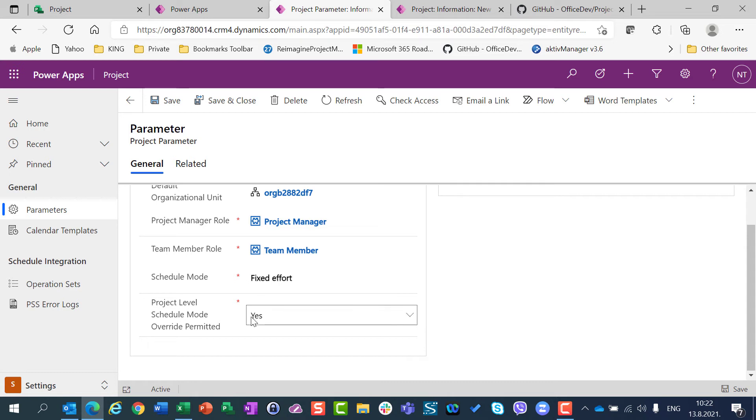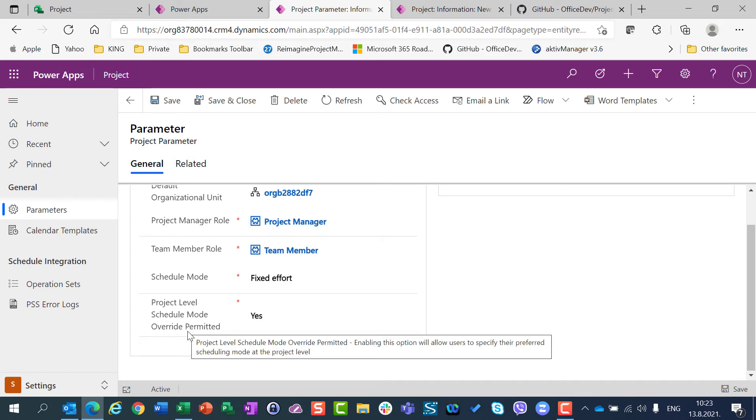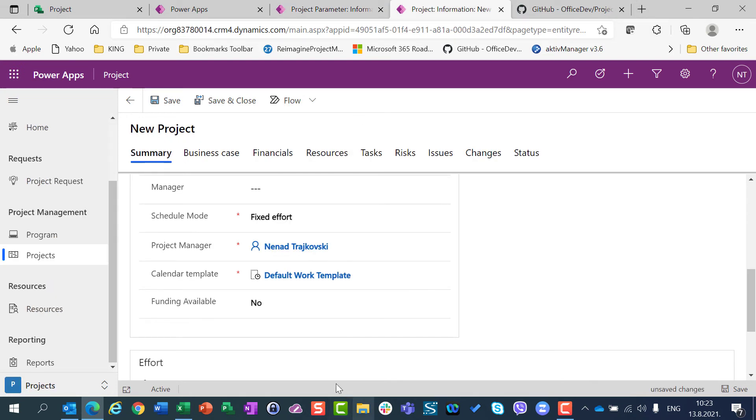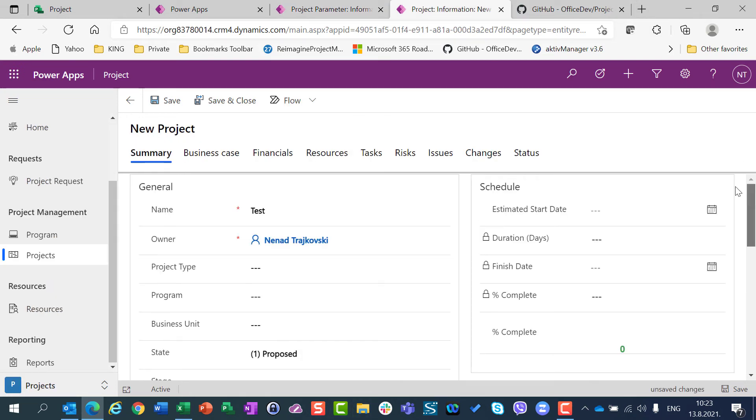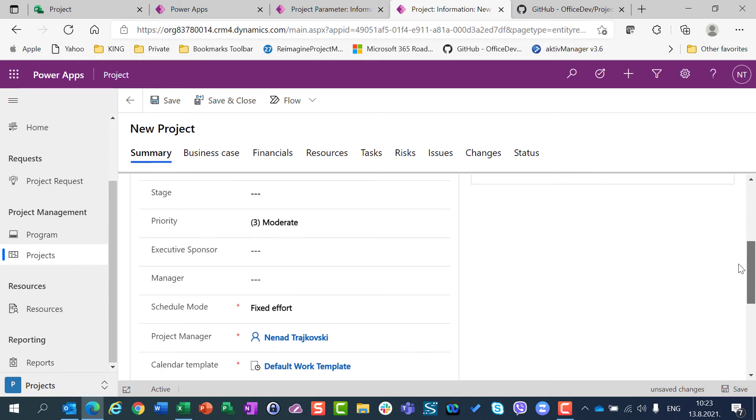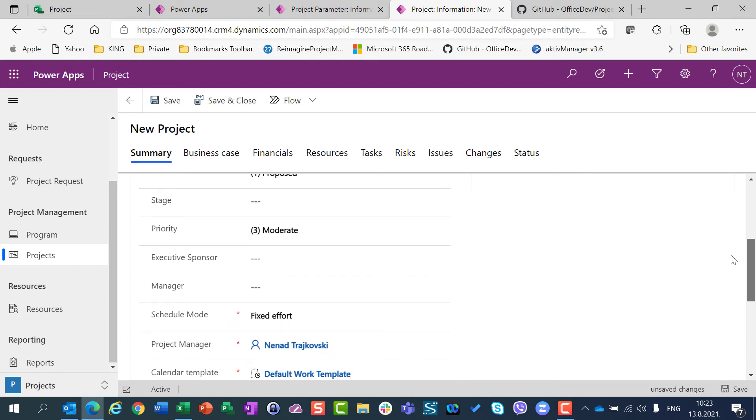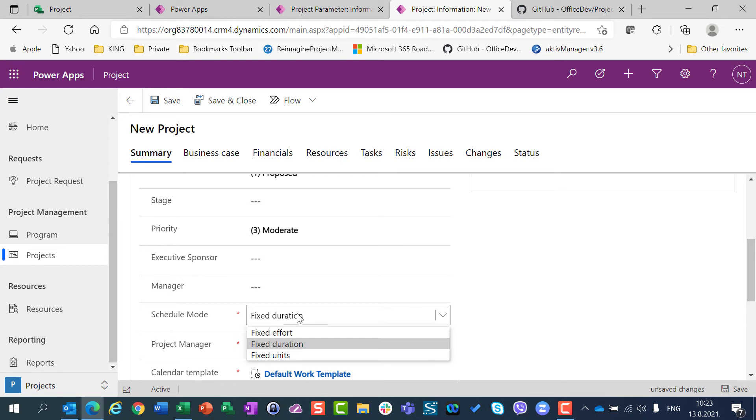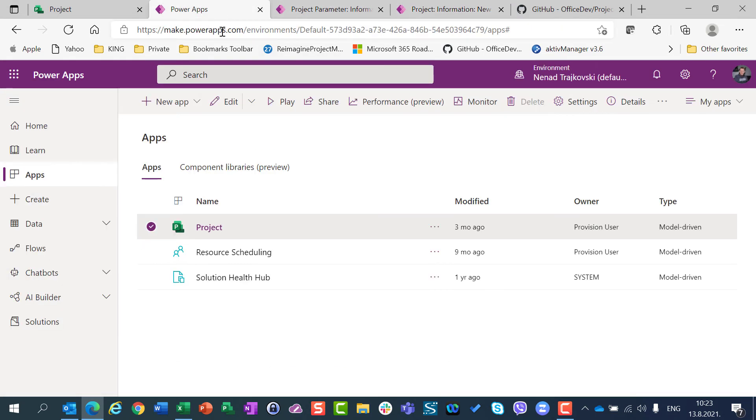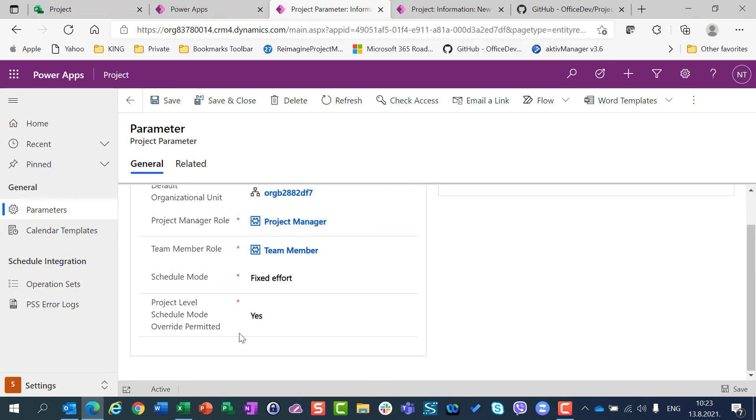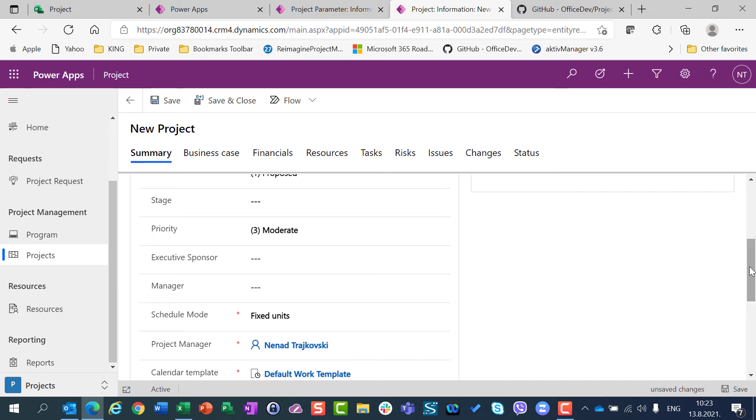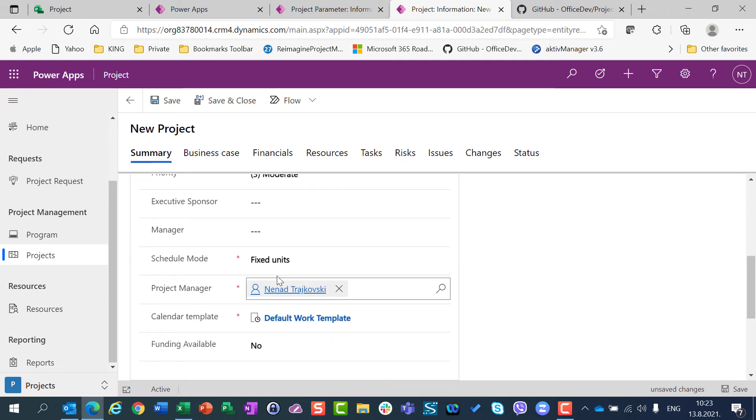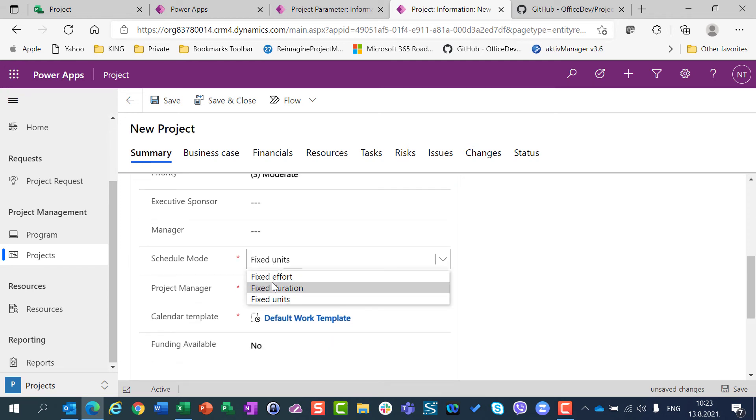And once, one thing more, here is yes, so because here I choose yes, that on the project level Schedule mode override is permitted, I have possibility to go here in Project Accelerator, and I can here say that it will be fixed duration or fixed units. If I choose here no, then whenever I will open or create a new project, I will have fixed effort.